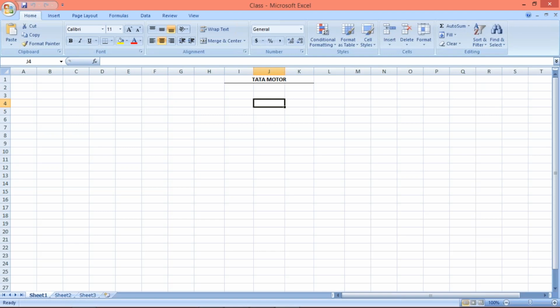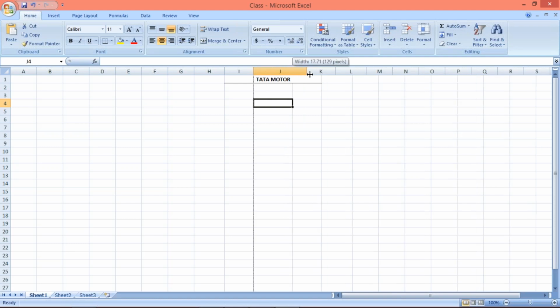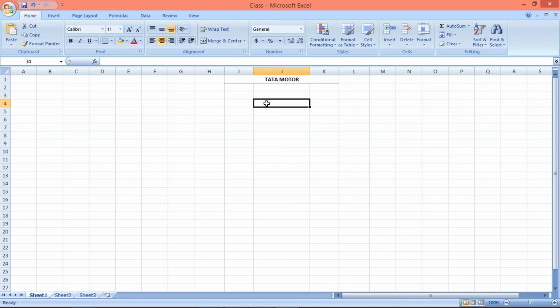So in the blueprint, what is happening? Let's suppose we have recorded all the requirements. Preparing a blueprint doesn't mean that we are going to prepare it from scratch, from the beginning. No. Every organization will have certain templates. A template is nothing but a previous blueprint which was prepared for a different client. So the consultant is going to copy that blueprint. It will be there somewhere in a shared folder. You need to copy a blueprint from there, save it on your desktop, and simply edit it. If we talk about the processes, they are quite similar. Hardly 10-15% changes or modifications will be done, and then it is going to be sent to the client for approval.